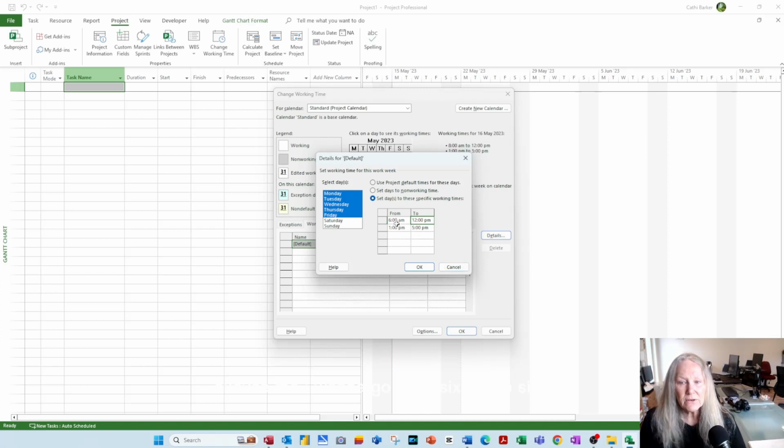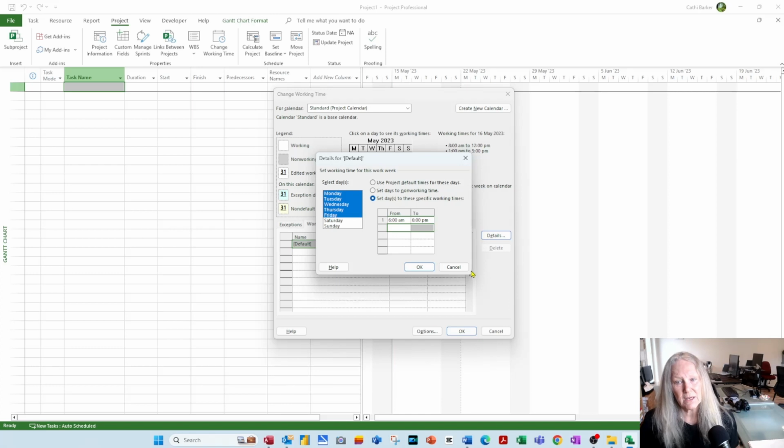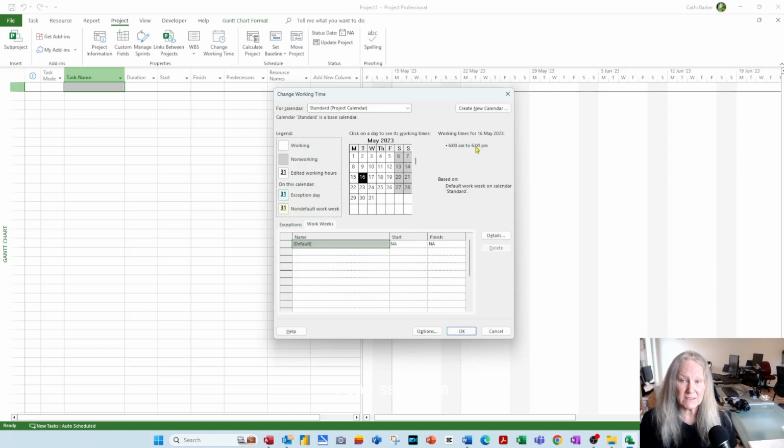I want to go from 6 a.m. to 6 p.m. So I'm going to take out the 12, put in a 6 and accept the PM. So I'm not going to worry about lunch breaks, morning teas, afternoon teas, too much work. I just really want to say this project as a whole starts at 6 in the morning, finishes at 6 at night, which means that row 2 is actually redundant. I'm going to click on the 2 for row 2, which selects the entire row, and simply press the delete key on my keyboard. And so I've gone for 6 a.m. to 6 p.m. If I click OK, now if I look here, I can see 6 a.m. to 6 p.m.